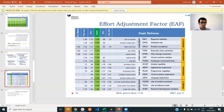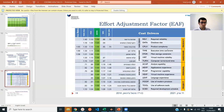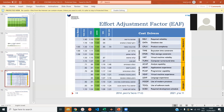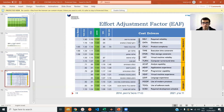So what we do is make a table. We have personal attributes and project attributes. For example, let's talk about programmer capability. If the capability is low, then you multiply by 1.14 — that makes the project slower. If your programmer capability is better, you multiply by 0.86 — that makes it faster. And the same applies for all the other attributes. Notice that some have numbers smaller than one. If your virtual machine volatility is low, that's good, so it'll make things faster.